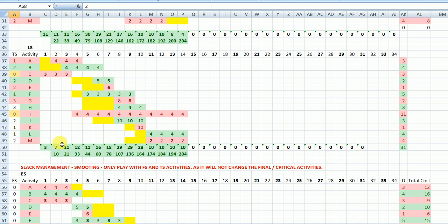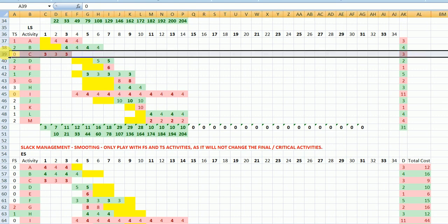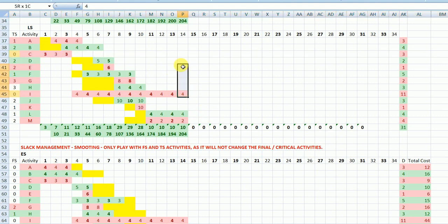What was my question? What is total slack? Total slack is, if I can change by 1, it will not affect my schedule. However, if it is 0 and I change it, it will affect my schedule. That means this is the critical path. Any changes would change the schedule, so instead of 14, it becomes 15 or something. So that's the story.